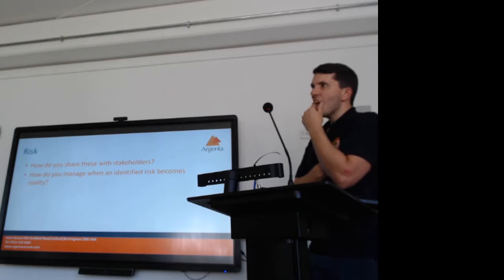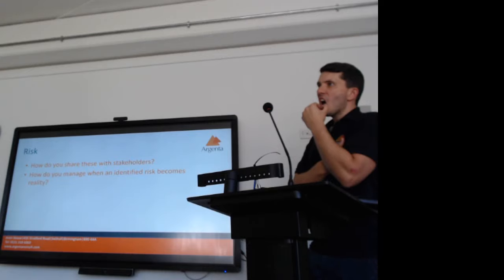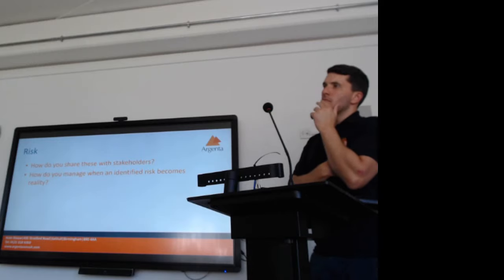So I'll share a horror story from my experience, which has made me a lot more critical on this. I do create a risk register. It's not hugely formal, but it has a structure. Is this likely to happen? What is it? What I really want to do is bring those forward in the project and try to tackle those first as the timeline allows. And that's normally when I share them.